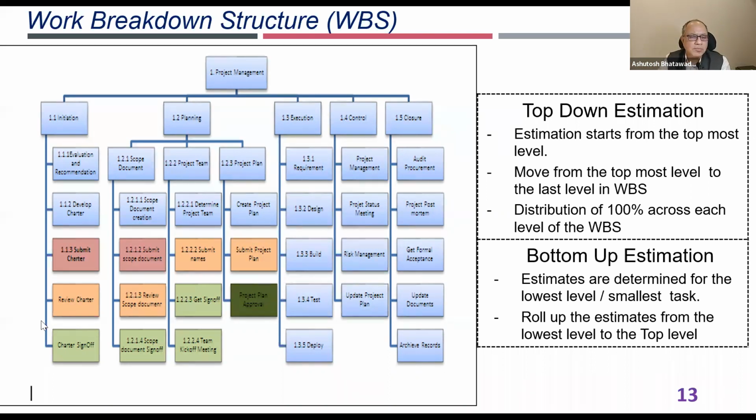estimation. And then what you usually end up doing in a top-down estimation is you start with the top, because as I said, you know the end date, you know the start date, and then you identify how much time is available, and then you tend to distribute the time amongst these phases, like let's say 30% for initiation. Okay, something like that, or not 30%, sorry, that's too much. 10% for initiation, 25% for planning, something like that you distribute. Okay, it's like how variable pay is given in our companies, right? There's a kitty at the top. That kitty goes to various business units. Business units then divide it into sub business units. Then sub business units divide it into programs and portfolios, and like that it reaches the project.